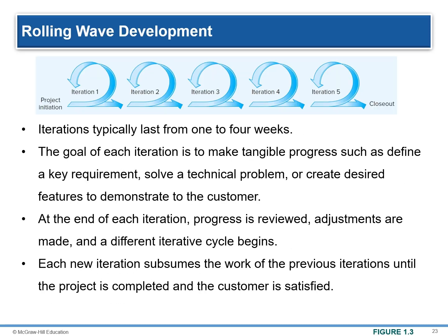In terms of the rolling wave planning model, it is a strategic project management technique where teams work within smaller waves or time periods to accommodate expected project changes. Teams start with the available information and define the work, deliverables, tasks, and budgets per the project scope. They work interactively and set goals and project milestones as they move forward to obtain more clarity. Rolling wave planning is agile, lets teams focus on short-term objectives with measurable deliverables with the bigger picture in mind. The project keeps moving ahead in smaller waves while planning for the next wave happens in the background.